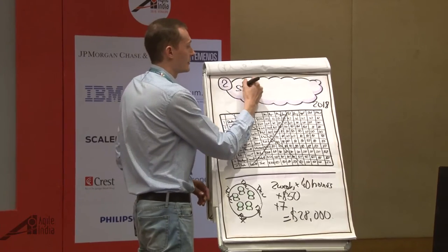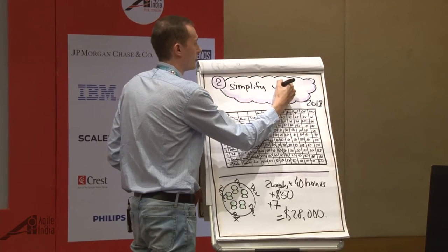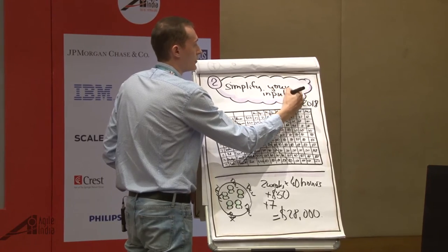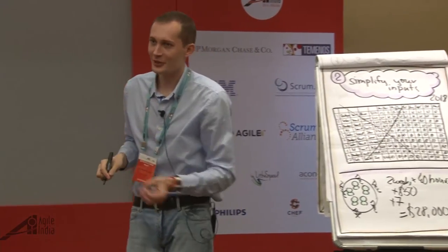That's the cost of my sprint, because it doesn't change — I always have this constant team. And if I only have $200,000, how many sprints can I have? About seven or eight. That's how you don't need the detailed spreadsheet anymore. All you need to say is: who needs to be in my team, what type of skills, and for how long? Simplify your inputs.